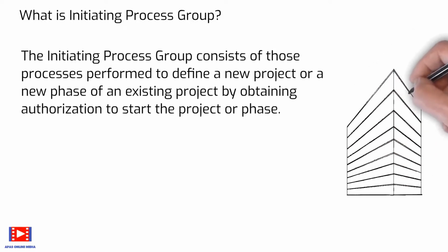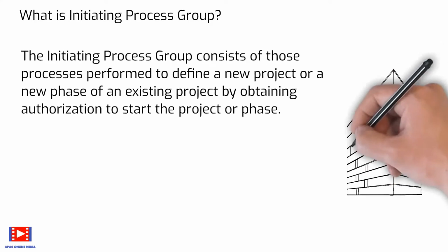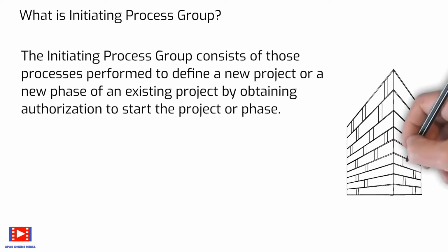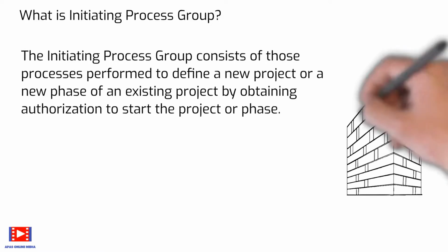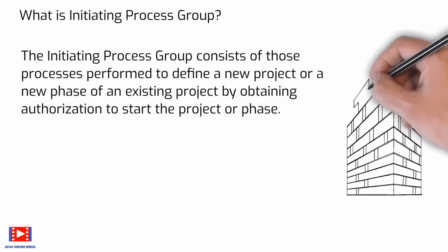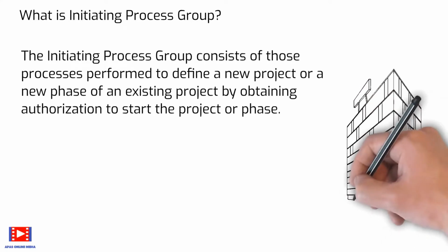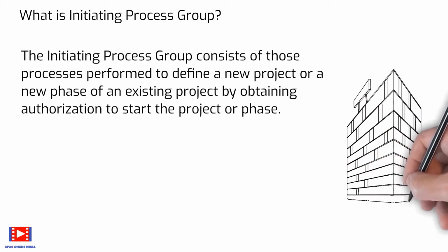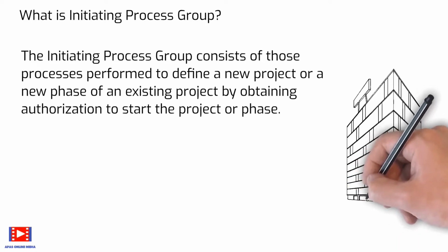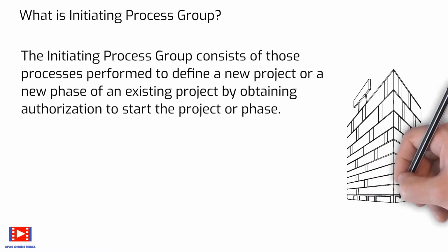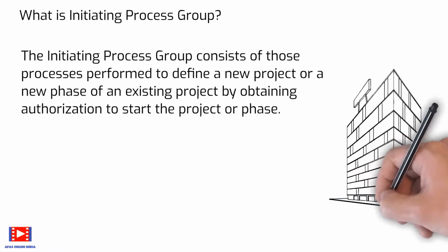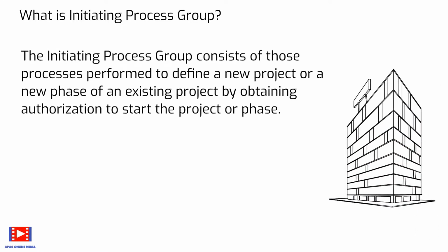If not already assigned, the project manager will be selected. This information is captured in the project charter and stakeholder register. When the project charter is approved, the project becomes officially authorized. Although the project management team may help write the project charter, the standard assumes that business case assessment, approval, and funding are handled externally to the project boundaries.